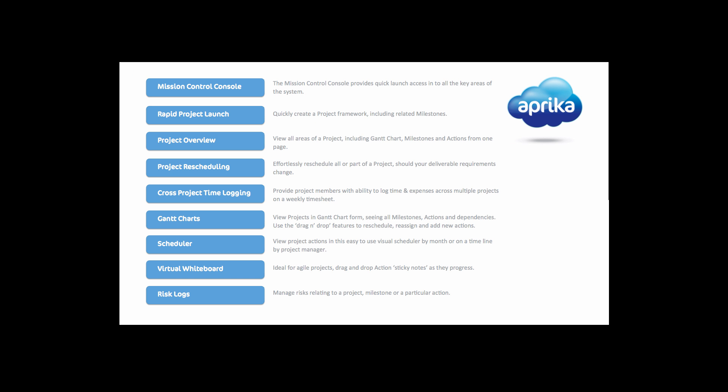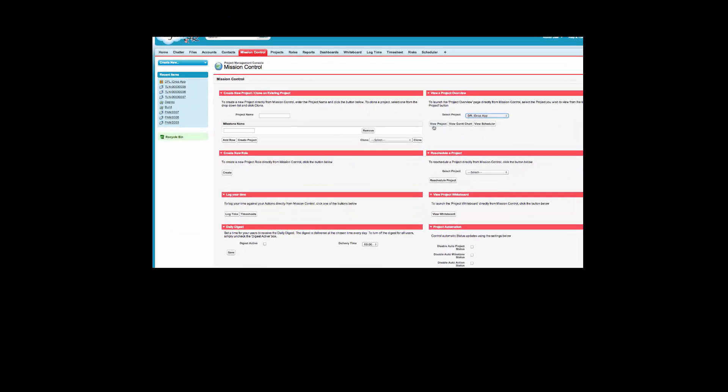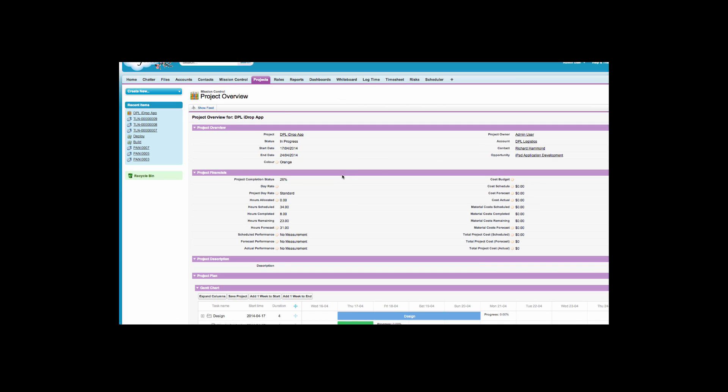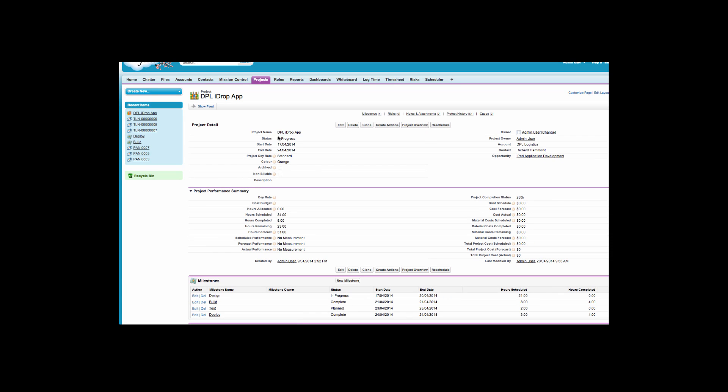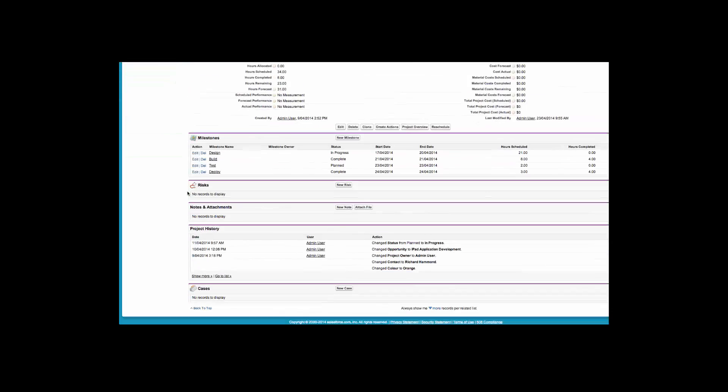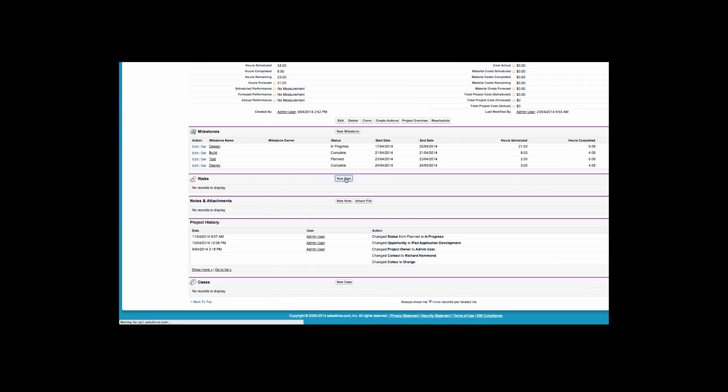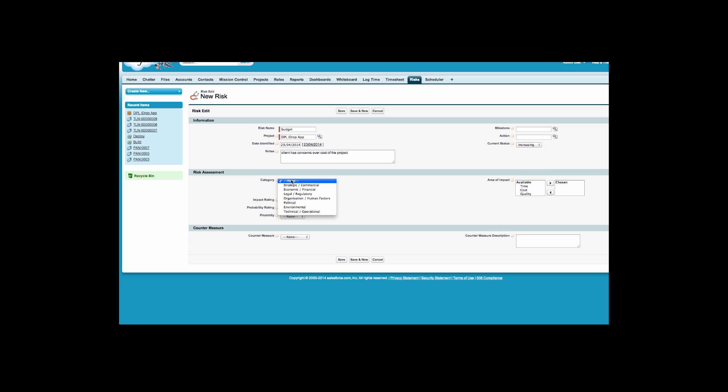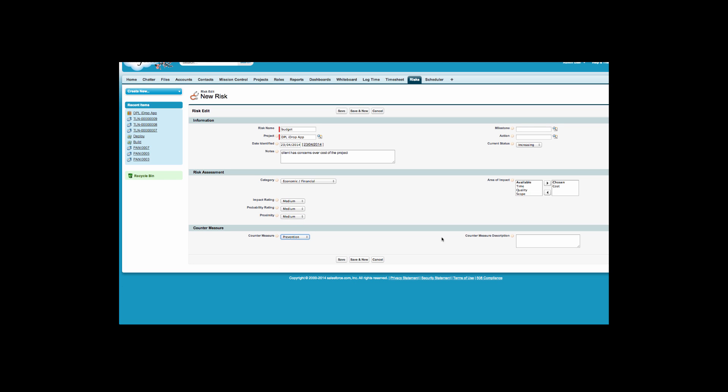A risk log object allows you to manage risks relating to a project, milestone or individual action. The risk log allows you to specify the details of a risk, categorize it and determine the risk score based on impact and probability. All risk logs will appear in the project overview page.